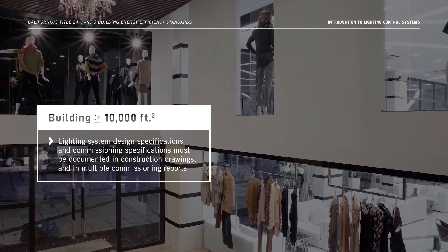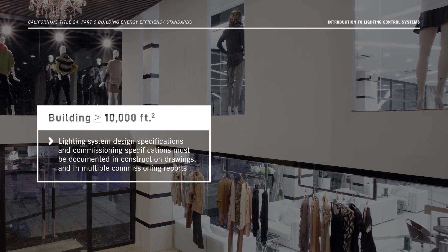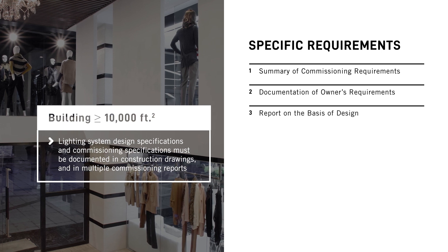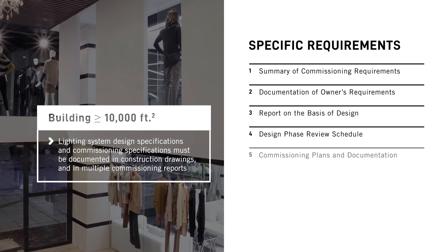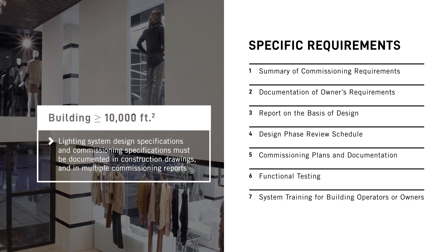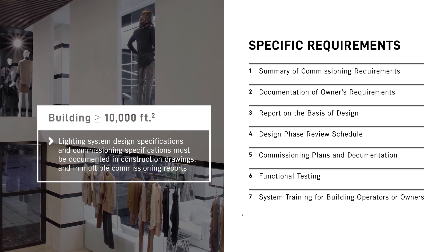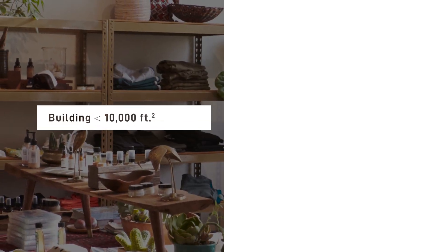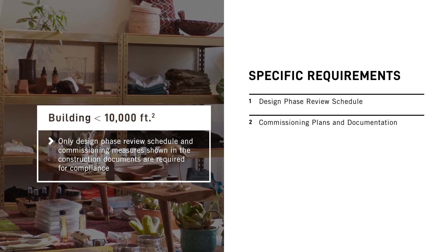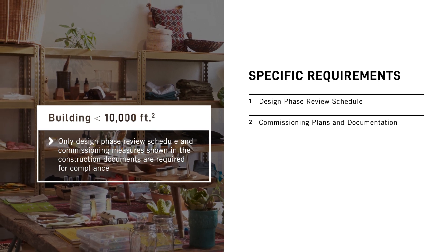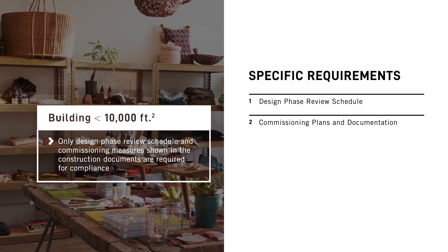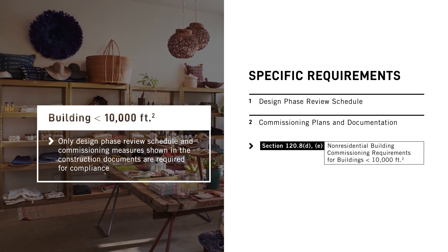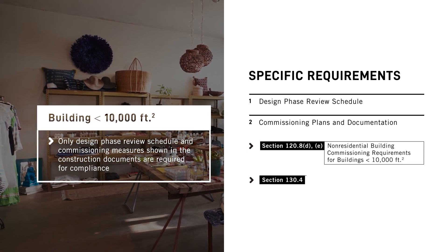The lighting system design specifications and commissioning specifications must be documented in construction drawings and in multiple commissioning reports. Specifically, you'll have to include documentation of owner's requirements, a report on the basis of design, a design phase review schedule, commissioning plans and documentation, functional testing, and system training for building operators or owners. More information on all of these can be found in section 120.8 of the Energy Code. For buildings less than 10,000 square feet, only the design phase review schedule and commissioning measures shown in the construction documents are required. While functional performance testing doesn't have to be documented as part of the commissioning process described in section 120.8 for buildings less than 10,000 square feet, acceptance tests still need to be conducted to get an occupancy permit, as outlined in section 130.4.